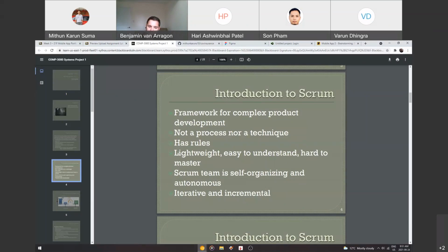Like you have a different sprint, and at the end of the sprint, you have a complete production that can be used. And then we continue to improve it in the next sprint and then the next sprint. Instead of doing it the waterfall method, where you do it from the start and then like 6 months later, you get the final end. Something like that. Totally. Yeah, that's awesome, Sunfam.